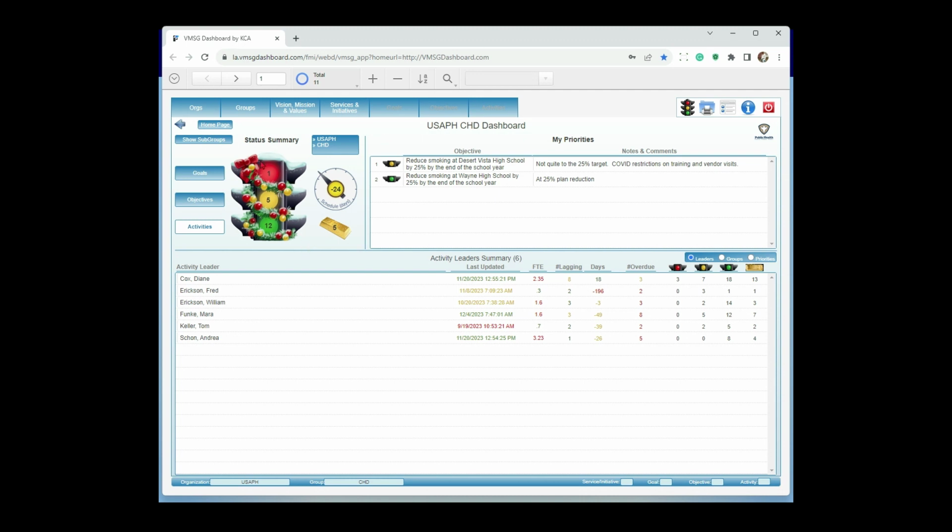So again, this is what the traffic light is giving me. I call this the big picture. It's the overarching look at it in a traffic light color and number format. The schedule gauge here, we talked about that before, I think also. The schedule is calculated, the timeline is calculated by, at the activity level, the beginning date, the ending date, and the percent complete.